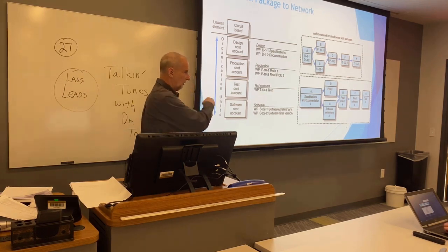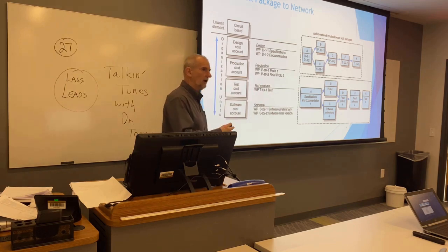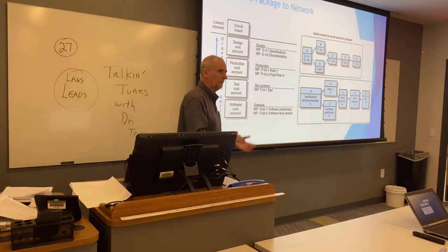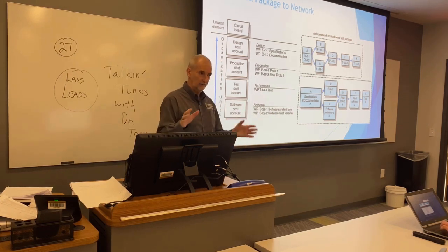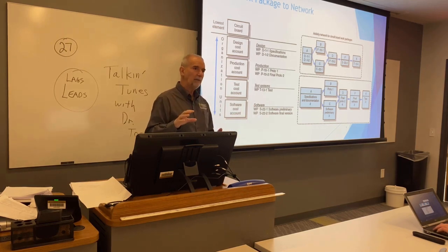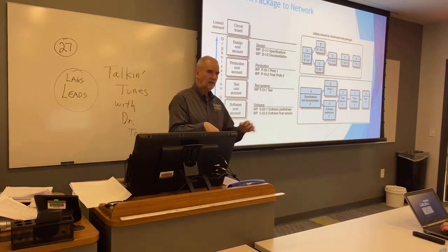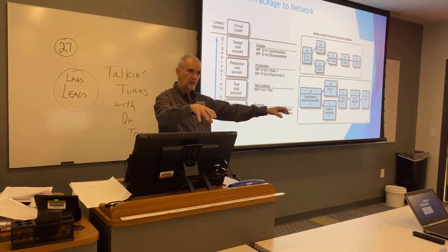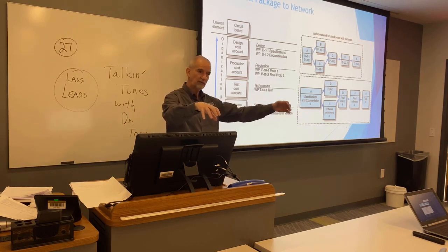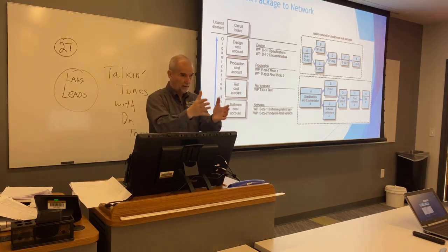So this is like a scroll. Imagine this being a scroll, okay? Now, when you're on task number 300, that means that tasks 1 through 299 are done, right? Do you care about them if they're done? If you're working on task 300, Dylan, you should be concerned about task 299, right? Because that came before. If it's not done, what does that mean for 300? It's not going to be done, right? Or you can't start it if it's not done because it's dependent, right? And 301 is dependent on you being done.